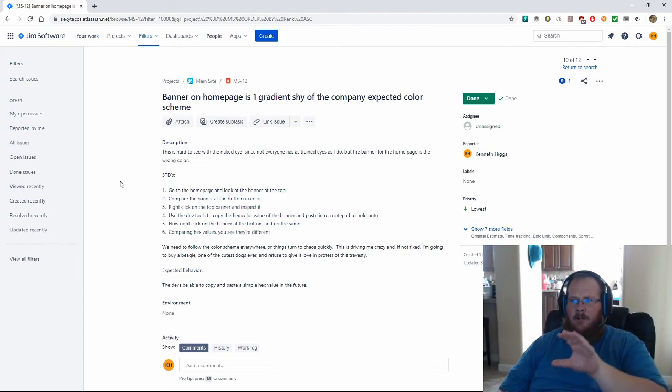And yeah, I encourage you to jump onto Jira, take a look at it, try to play with it, try to interact with it. There are lots of videos out there and tutorials on how to use Jira, but use it to write up some bugs. Make sure that you include in the description what the initial issue is, what the steps to duplicate it are, any additional context that you need to provide for why this is all a problem, and then the expected behavior for what you want to have happen from it.